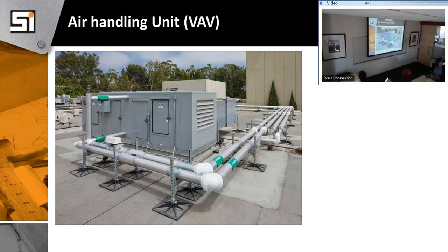There are supposed to be kickoff meetings. You're supposed to have kickoff meetings with everyone, and it's supposed to be documented. It says so in Title 24. And now there's a lot more testing of the equipment that's required. Right now NEB and TAB are all trying to get certified technicians for certain testing. They're not ready. They're not trained. I think they pushed that requirement out a year from July 1 or a year from January 1, because they don't have the people ready to do what the state is requiring.